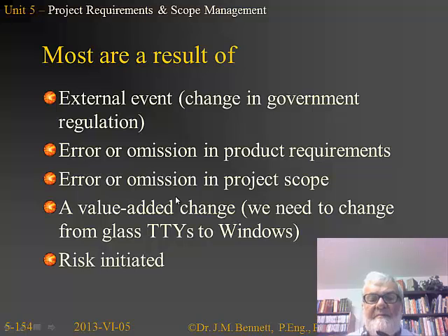In other words, one of my favorite examples was an example done by the federal government to try and integrate all of the various accounting activities of all of the departments across Ottawa. Now, it turns out there are about 85 different departments of various sorts, so this was a huge modification, because every one of those departments had their own individual accounting system. So they quite rightly thought, well, why don't we have an integrated one? Woo-wee, that was a biggie. It was a 4-year project, and about halfway through the project managers were so frustrated, yes, that I said plural, that they said, we have to freeze requirements regardless, or we'll never get this project done.